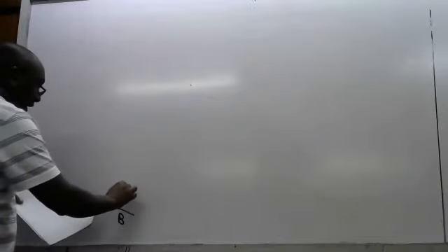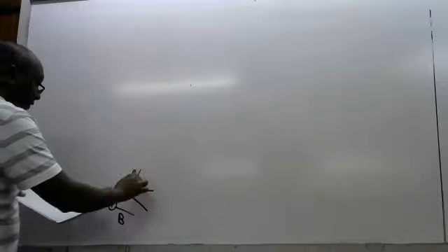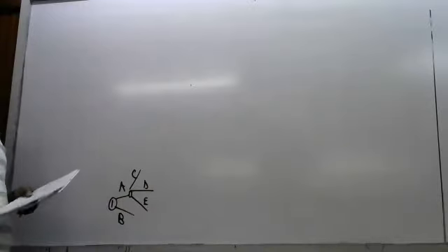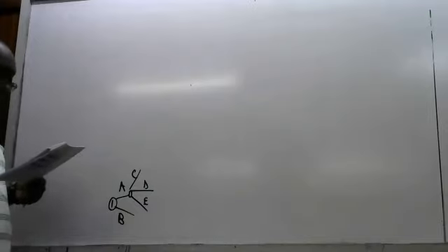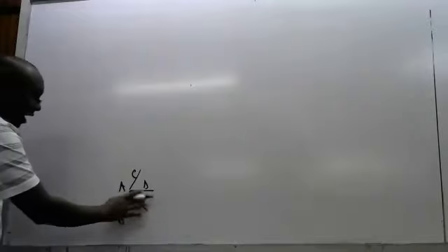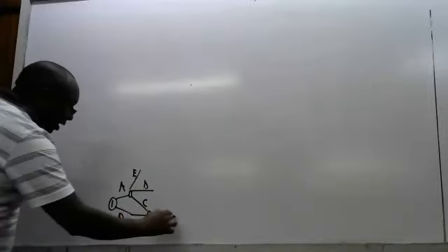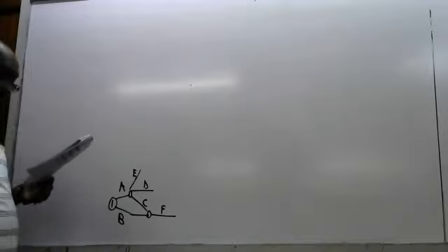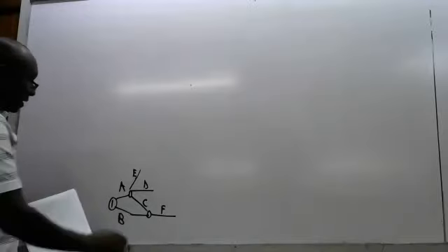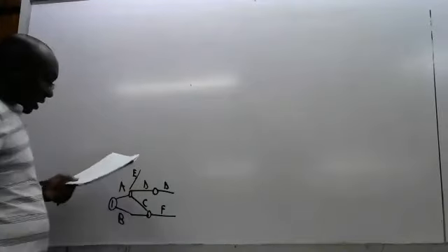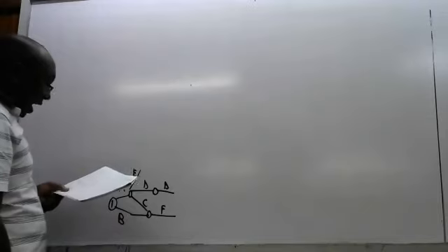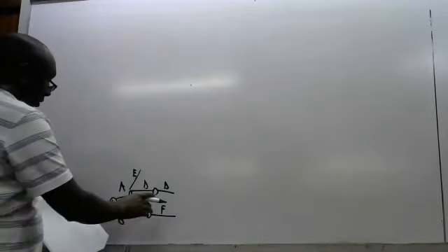You can see here, A is not preceded, B is also not preceded, but A is preceding 3 activities, that is C, D, E. Then F is preceded by B, C, so I change C here, this one I can make it E, so that B, C here, they precede F. Then G is preceded by D here. And then H is preceded by E, F, G.